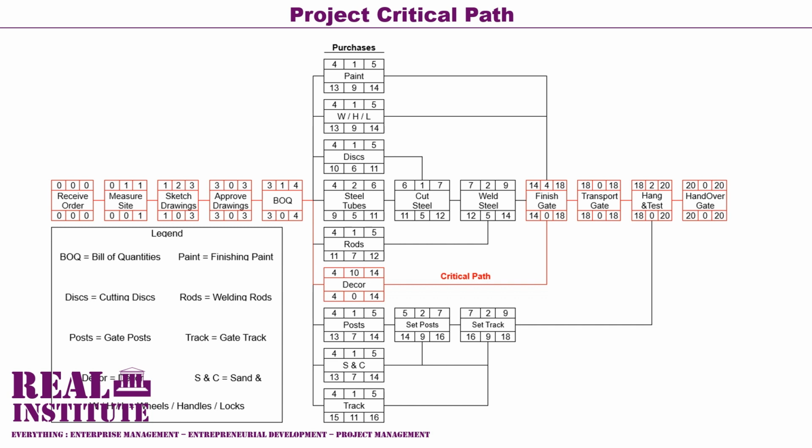They constitute a visual trajectory through a project network diagram that results in a feasible project duration. The sum total of the durations of the critical project activities adds up to the feasible project duration. In every project, this is the case. In the case of our example, the feasible project duration is 20 days.